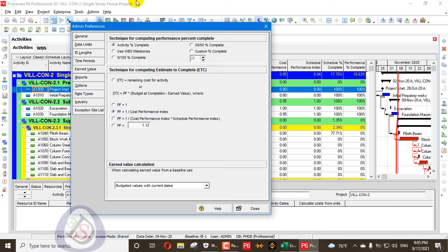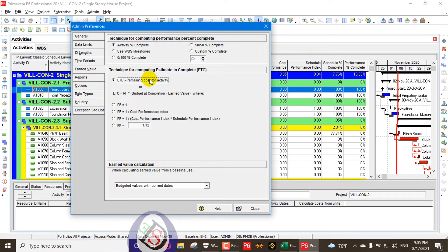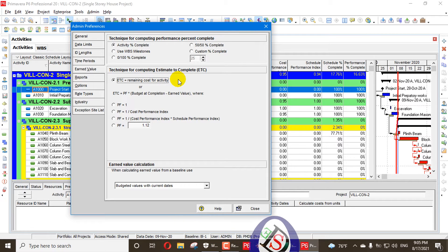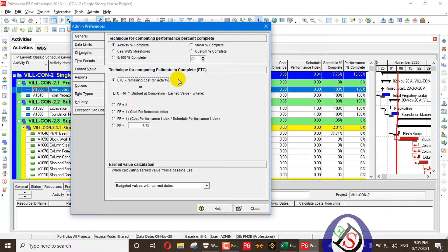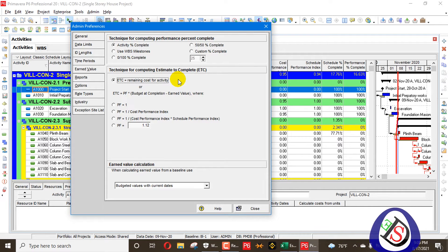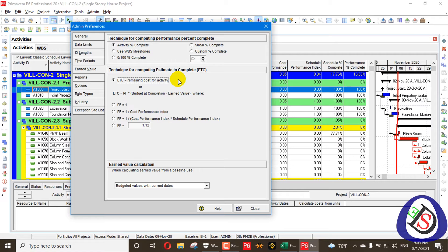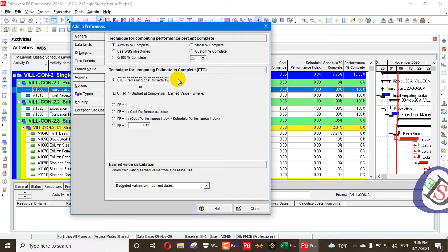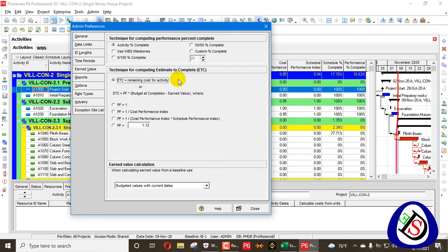The first option is ETC equal to Remaining Cost for Activity — meaning the total budgeted cost minus what you have actually achieved gives you the Estimate to Complete. The second option is ETC equal to Performance Factor (PF) multiplied by Budget at Completion minus Earned Value. There are several sub-options for how to calculate the Performance Factor.